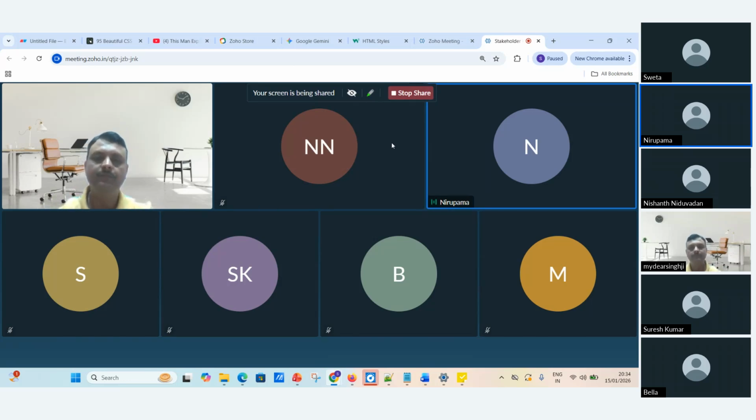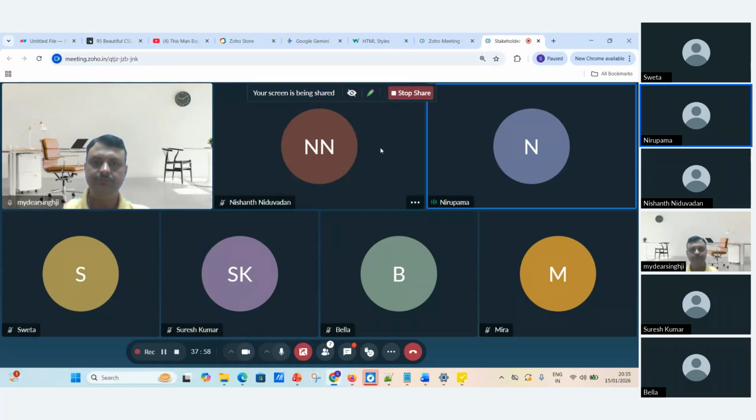They need to know what is the return of their investment, what are the business impact and risks. So this is for upward stakeholders who are above PM level. Below PM level, when we talk about team members, analysts, and direct reportees, for them we generally communicate in a very detail oriented way, with frequent updates.